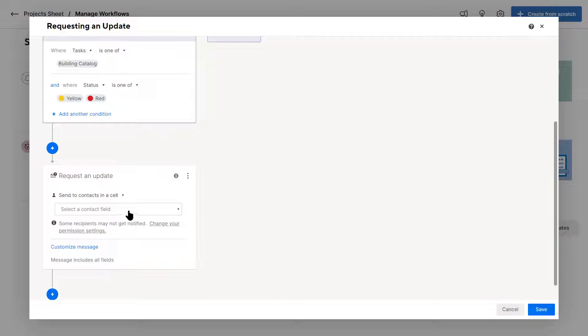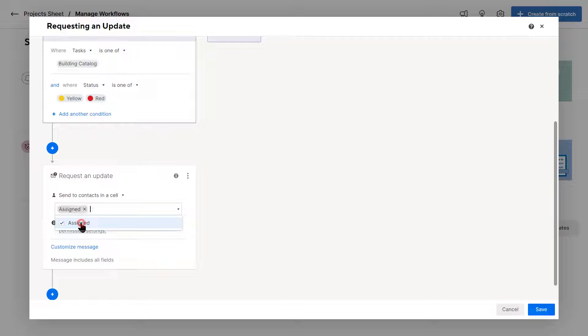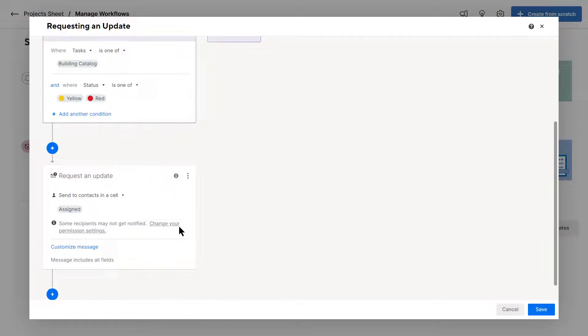I want to select the one that has the contacts label. So assigned is a contacts column. So whenever row one has Denzel as the name or the primary person, it's going to send it to Denzel. And if somebody is in number two, it's going to send it to them instead of sending it all to one person.